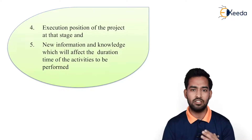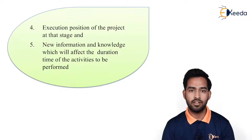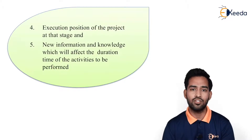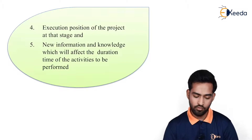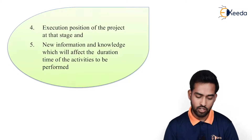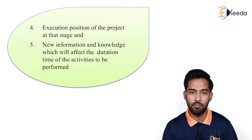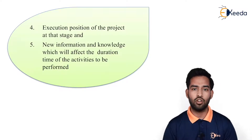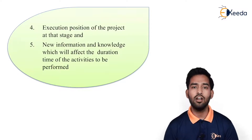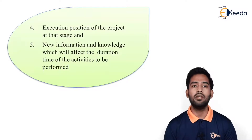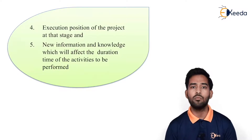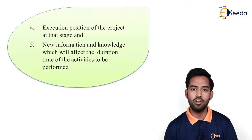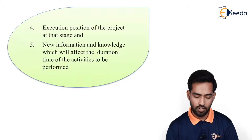For example, if we are constructing a G+10 building and the fifth slab is being constructed, and now we are updating the schedule, we should know that exact time and the execution stage. We also require new information and knowledge which will affect the duration and time of the activities to be performed — for instance, new techniques being used, because of which some following activities will get affected. Some activities may require less duration because of new technology, or some may require more duration or more resources. That updated information we should know at the time of updating.